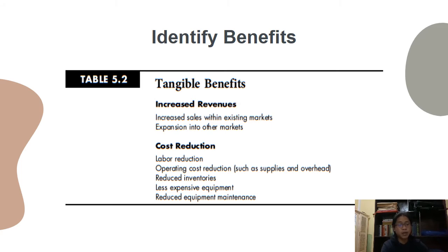When measuring cost savings, it is important to include only escapable costs in the analysis. Escapable costs are directly related to the system, and they cease to exist when the system ceases to exist. Some costs that appear to be escapable to the user are not truly escapable, and if included, can lead to a flawed analysis.